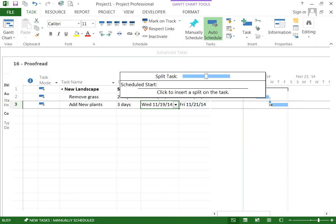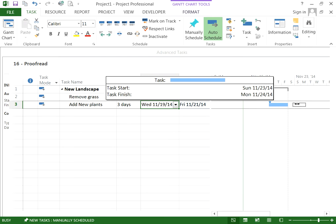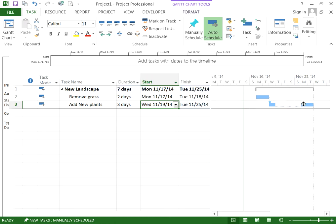Then you put your cursor over the Gantt chart bar, and as you move it to the right you're going to see dates pop up showing you from what day you want to split. We want to split it after the first day, taking the second and third day and moving them forward in time to Monday the 24th. To do that, you click and hold and drag it to the right to the date that you want.